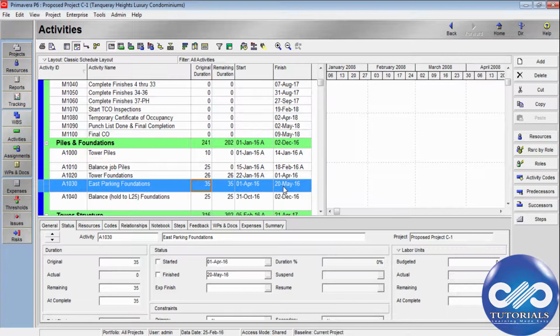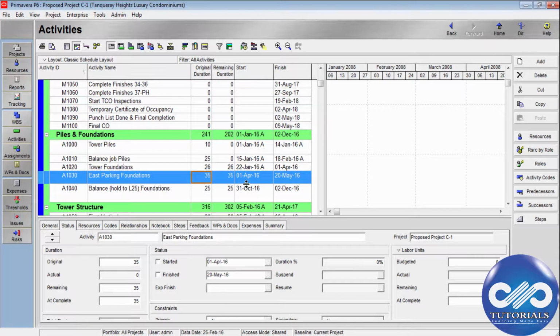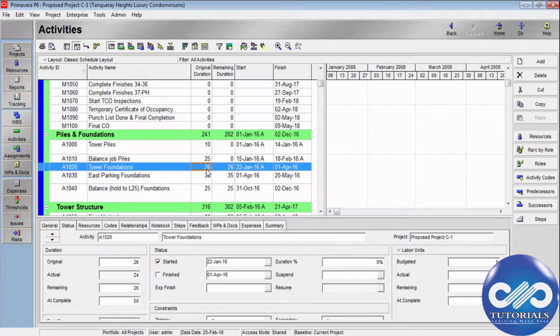For the started activities, for example, for this one, if I do it for 26 to 36, you can see this being unchanged. For the started activities, you should be going directly to the remaining duration. Rather than changing the original duration, you should be changing the duration in the remaining term. So here you should be making this 36, and you can see the change in the finish dates from 31st to 40. So this is how we change the durations in Primavera to see the real effect on the